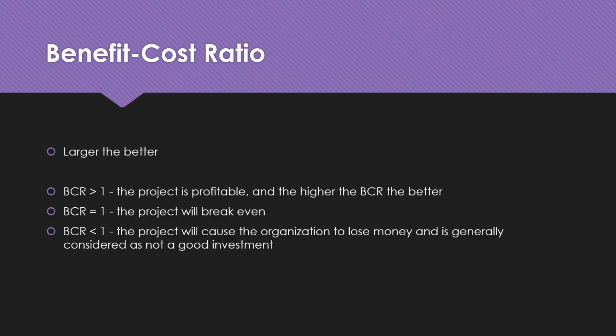If BCR is equal to 1, the project will break even. That means whatever you put in financially in the project, you will get an equal amount back. If BCR is less than 1, that means the project will cause the organization to lose money and is generally considered not a good investment.